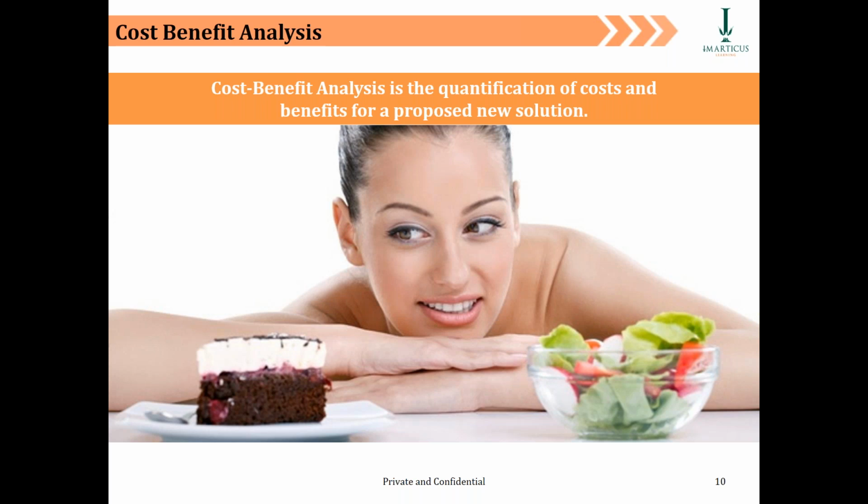If the business case is positive, which means the benefits accrued out of the project are going to be more than the costs, then obviously the decision will be a go ahead. If the benefits accrued may be less than the cost involved, which means the typical benefits will be there, but honestly, it's never as attractive as the fact that we spend $1 million on the project, so it's a no go decision.